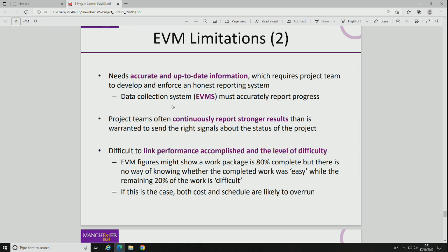And it's called the best case and the worst case, because in the CPI world, you're adjusting your estimated cost at completion, but also if you include the CPI and the SPI, if the CPI is bad, the SPI tends to be bad as well. So it's termed a worst case there, because you're combining both poor effects. But it doesn't necessarily have to be a worst case. It's an expression which experienced people have put to it, because it tends to be a worst case. It doesn't necessarily have to be, because your cost performance could be poor, but your schedule performance might be good.